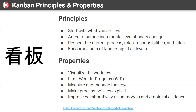Number two: limit your work in progress, or WIP. Just like in manufacturing where you need to understand the capacity of a machine, a team, or the entire organization, you're going to use WIP limits to limit the number of cards in what we call WIP columns. I'll illustrate this better on a board in a few seconds.